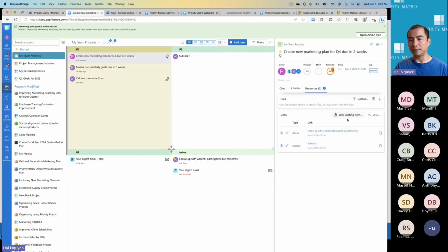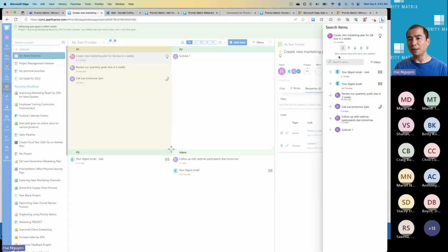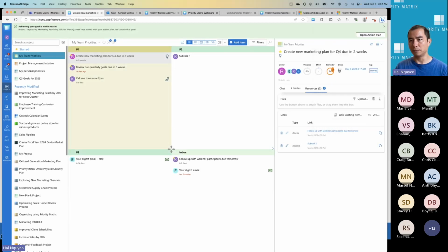And when I link to another task, I can set dependencies. For example, I can say this task is blocked by, this task blocks, this task is caused by, or this task causes. These are ways for you to link these tasks together and communicate a causal relationship between them. So if you have a bunch of tasks that are related to each other, I recommend using this relationship resource.